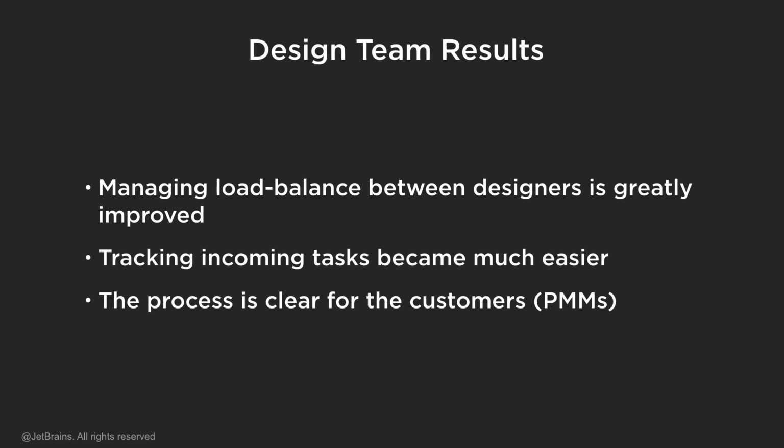Of course, we do change things there, we add new things there, we change the priorities, but it's the big plan. And for the design team, they just track it every day, and they take the tasks from these uncategorized cards and move them to the specific designer swim lane right away. So if you need a really short-term backlog, of course you can use this top swim lane, and it might work for you perfectly.